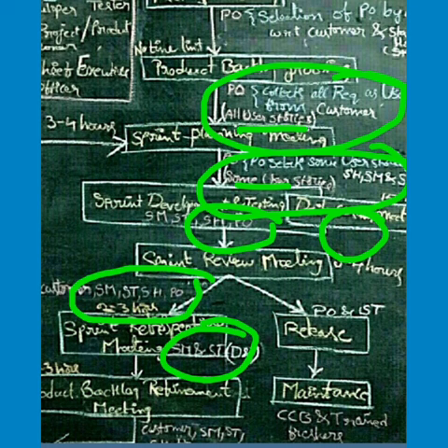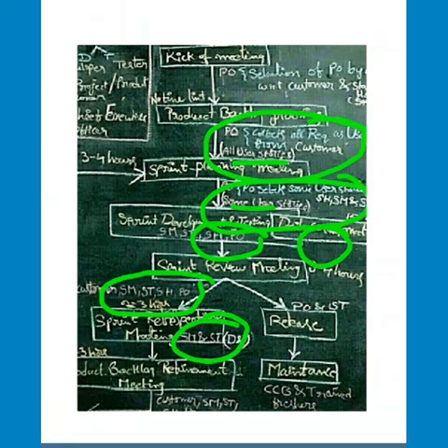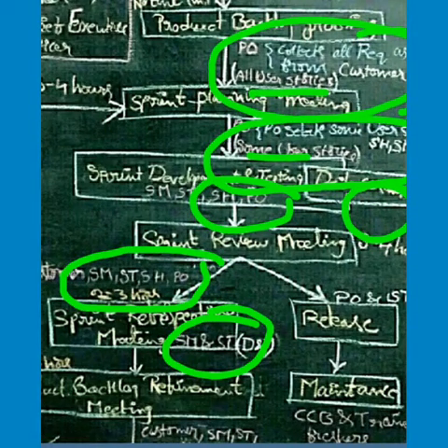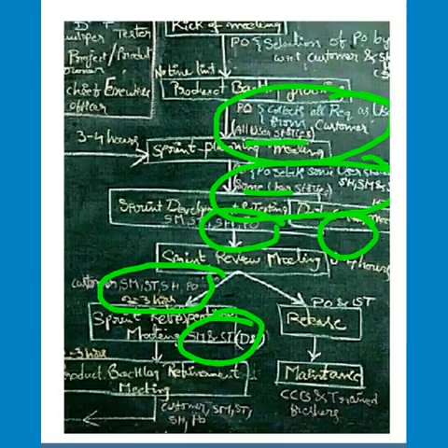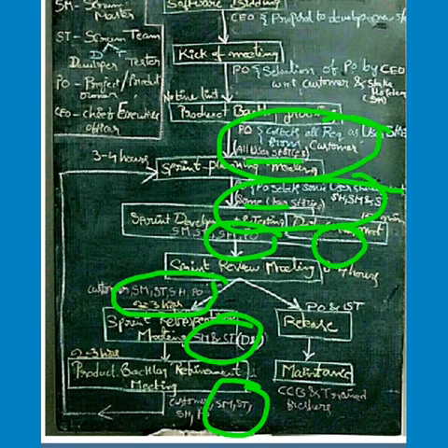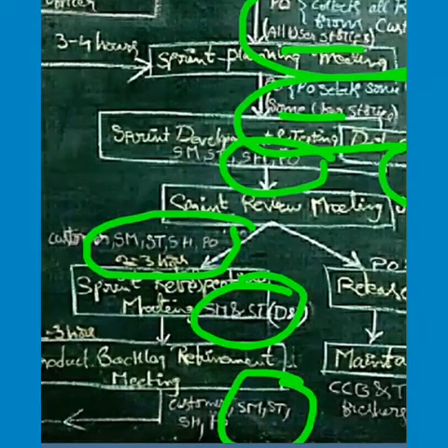to mention the issues you faced with the previous build, or the problems you are having with the Scrum team members. All these details you have to update to the Scrum Master in this sprint retrospective meeting, and whatever measurement steps we have to take for the next sprint are communicated in this meeting. Then the Scrum team tester has to participate in the product backlog refinement meeting to collect the changes in requirements specified by the customer and stakeholder.